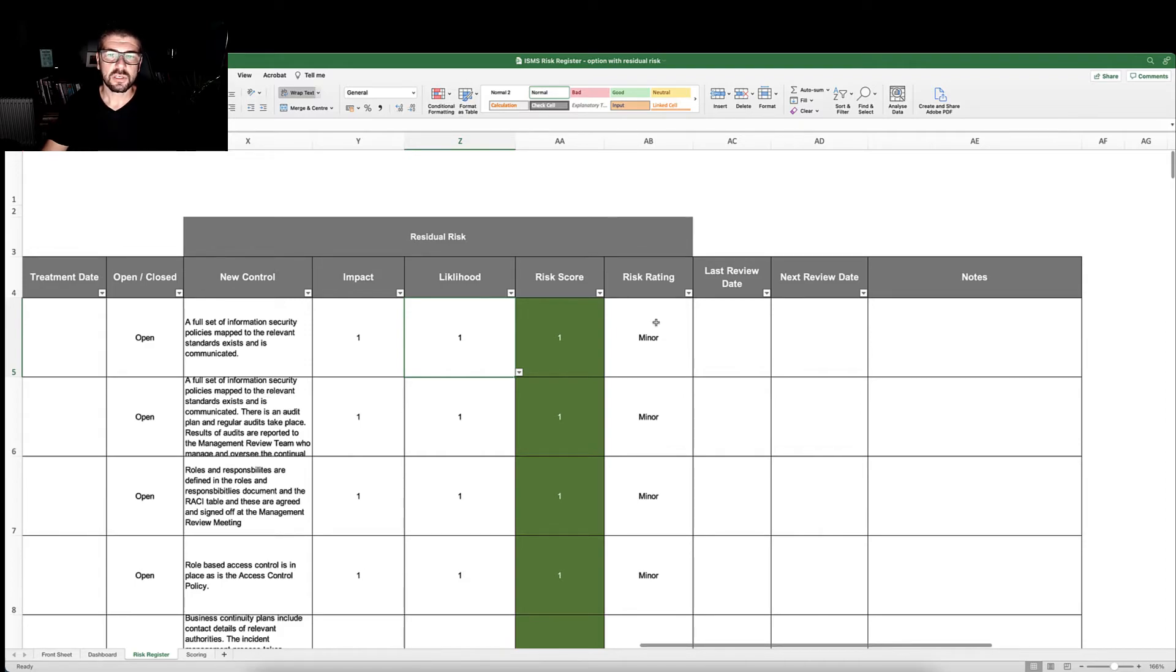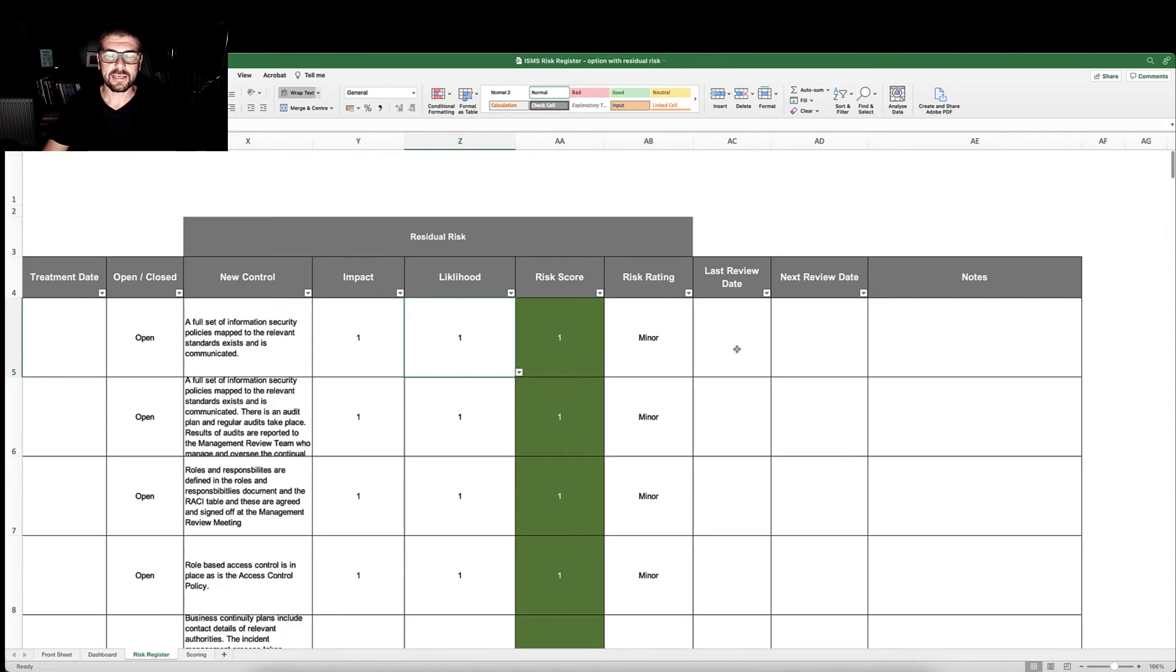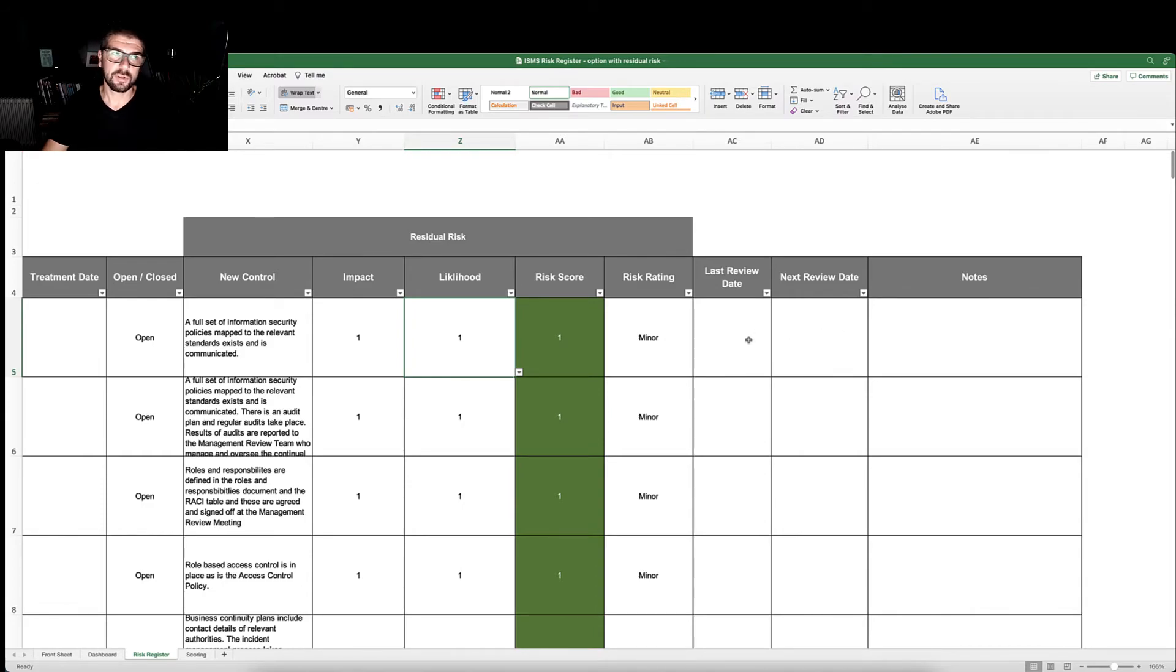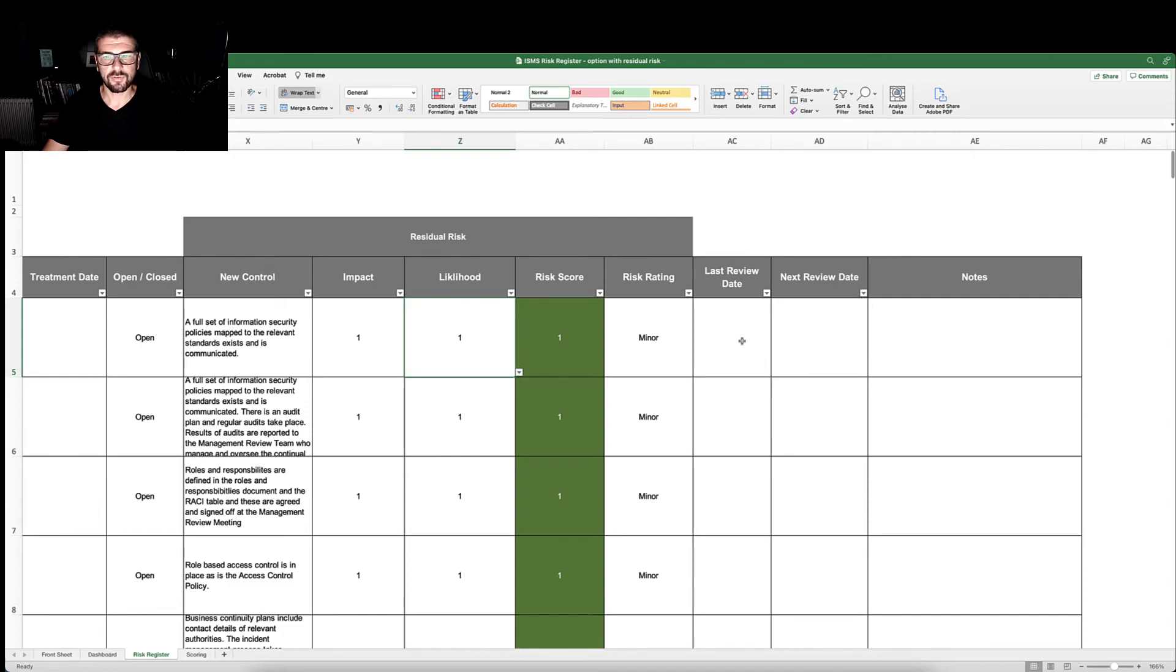This will give us a new risk rating. We're then going to allocate the date that the risk was last reviewed. Risks should be reviewed at least annually and based on risk themselves. The more risky a risk is, the more critical a risk is, then the more often you're going to review it.